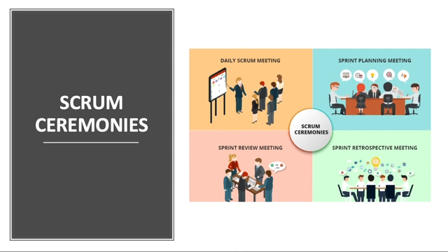Then we have the sprint review meeting. This is where we demonstrate our new functionalities to the team. This is done at the end of the sprint. The increment delivered is inspected and feedback is obtained from the stakeholders in order to adapt the plan for upcoming sprints. All relevant stakeholders must assist the team with valuable product feedback. And it has a duration of 4 hours for the entire sprint, which is basically a month.